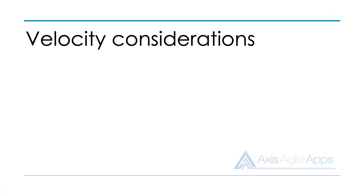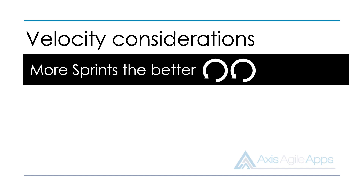When it comes to velocity, there are a few points to keep in mind. Firstly, the more sprints the team does, the more reliable that metric will be. If you're in the early days and just doing your initial sprints, you might find that the velocity isn't all that accurate. But don't worry — after your team gets through a few sprints, it will start to stabilize.